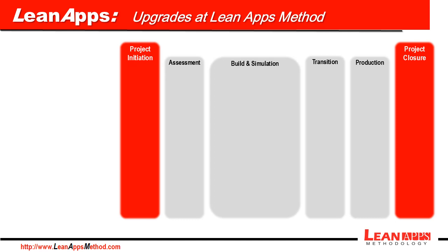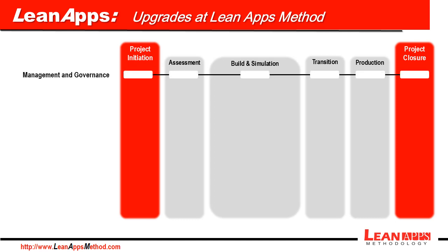The cutover plan is executed and the system is deployed to production. Then we have the final phase, which is production, whose purpose is to decommission any legacy system and co-support the system along with the client's personnel.